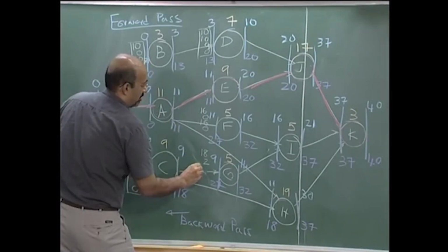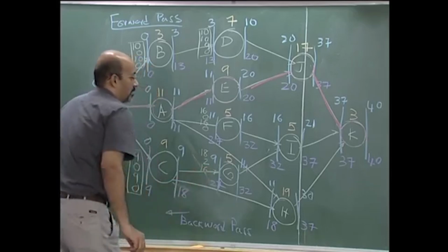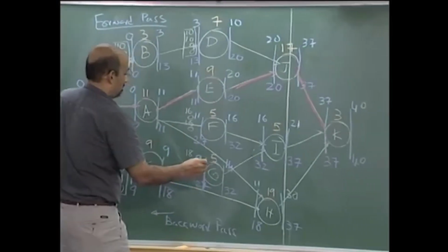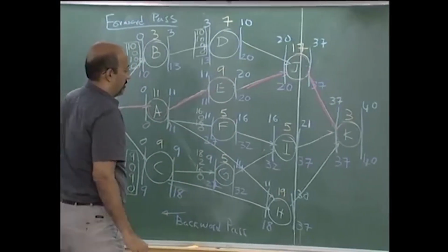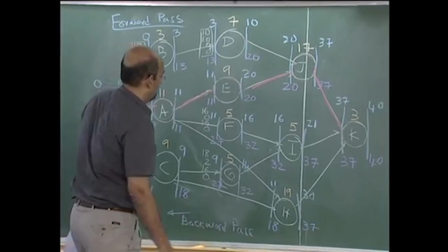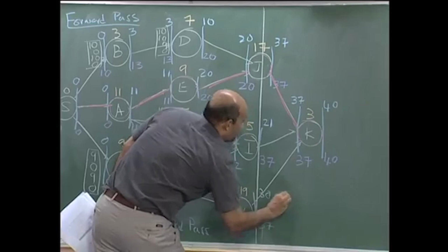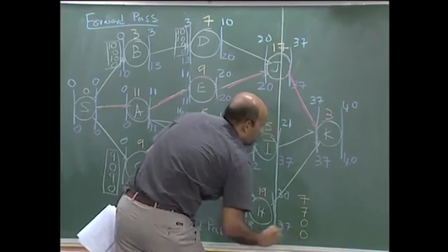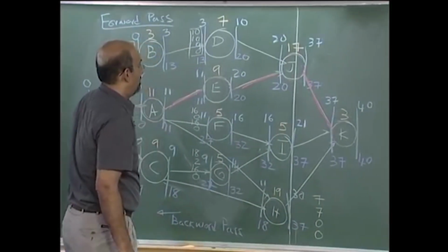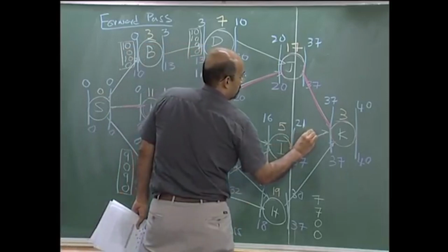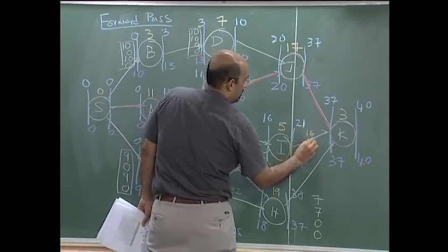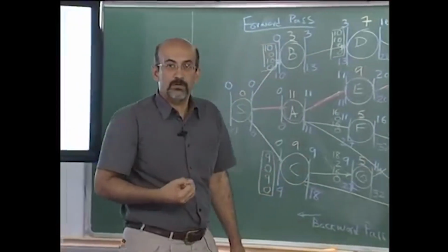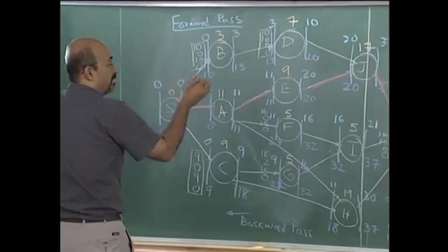So interfering 16, independent 0, okay. So that's again negative 0. We come to H, 7, see free float of 7, 0, 0, okay. I, 16, free float 16, 0, 0, okay. So through this we have solved all the parameters we are looking for.